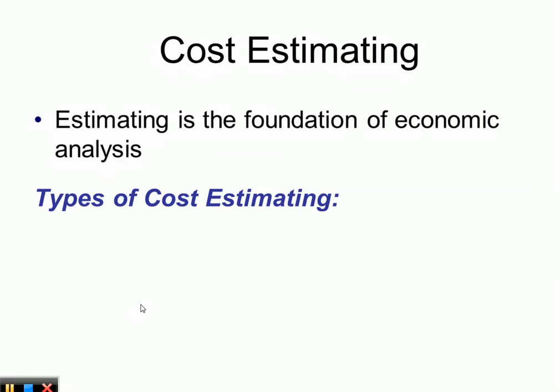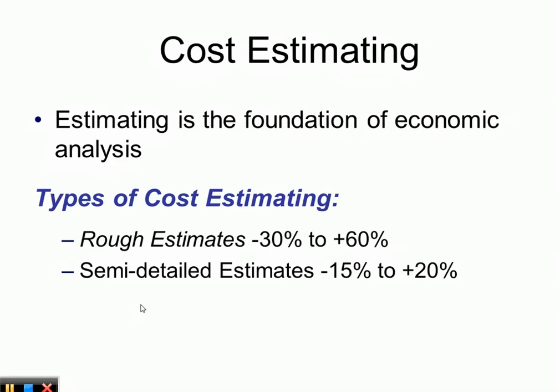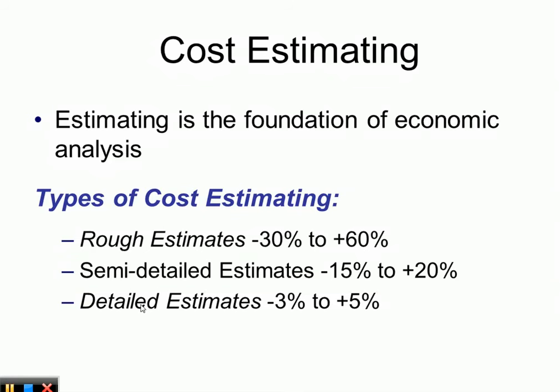There are three different types of cost estimates, and they vary based on accuracy. Rough estimates have error between minus 30% to plus 60%. Semi-detailed estimates have error between negative 15% to plus 20%. Detailed estimates have error from minus 3% to plus 5%. As you can see, the cost could be 60% larger than what you estimated if you're doing rough estimates.